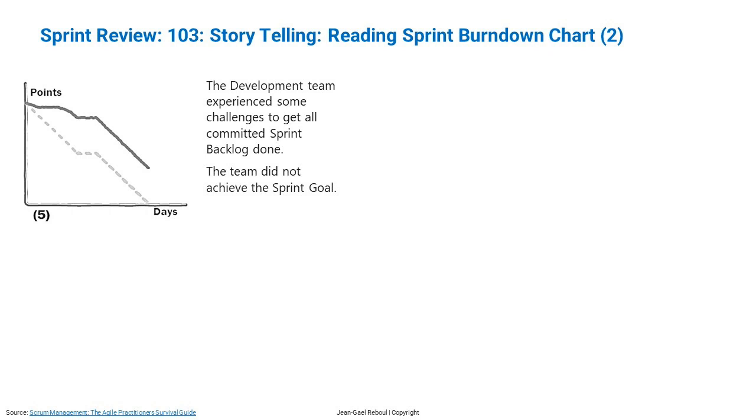You can see here, that the team did not achieve the sprint goal because not all committed backlog items made it to the done state. Why? There could be many reasons. Maybe a user story was not sufficiently defined and should not have been brought into the sprint backlog. Maybe there was a technical issue that surfaced and couldn't be resolved on time for completing the underlying backlog item. Or maybe, a team member felt sick and had to sit on the sideline for a few days.